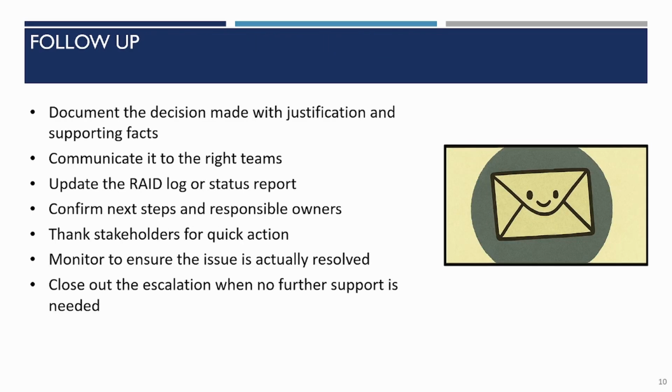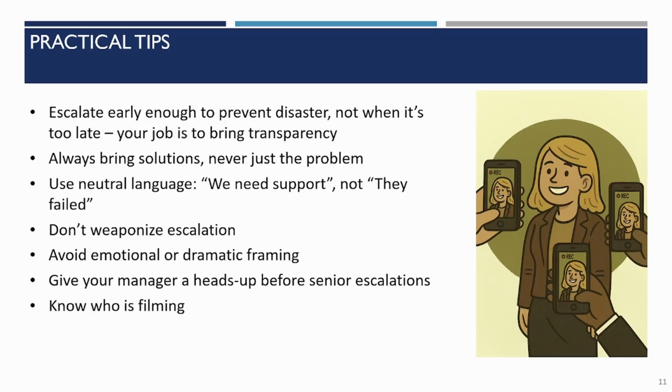And I recognize there's organizational politics and all sorts of nonsense that you can't really account for, but generally staying calm and focusing on the facts works. And then you want to follow up, document the decision with the justification and the facts, communicate it, update the RAID log if needed. What are the next steps? Thank them, obviously, show gratitude, and monitor to make sure it's actually resolved, and then close it out.